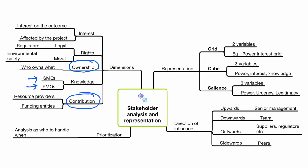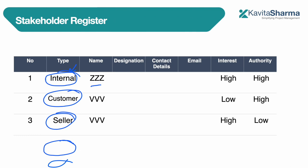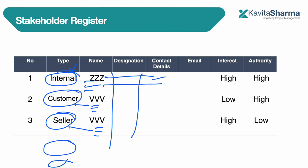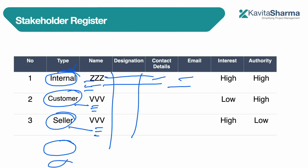We don't write stakeholders in categories — we write names. Type of stakeholders: company, customer, seller, users — and for those people we write names, contact details, email IDs. You should know all this. After that, we need to know how much information each stakeholder wants to know about the project.